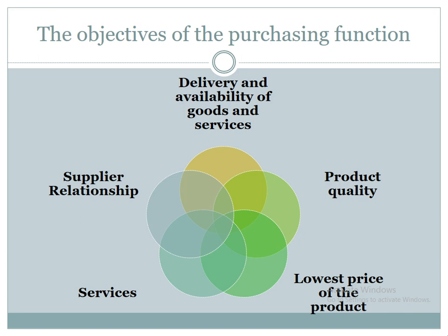If we give them orders, then in how many days the vendors fulfill their orders. Then what are the various criteria regarding payment, that is whether the vendor agrees for cash or for credit, or whether after delivery we are paying them. So such parameters are evaluated, also quality is evaluated, and the vendors are given a rank,